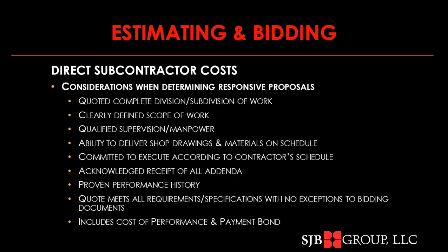Does the subcontractor have a proven performance history? Does the quote he's providing meet all requirements of the specifications with no exceptions to the bid documents? Does the quotation include any performance and payment bonds? One note, since a lot of us are subcontractors, this might be a good list for us to review to improve on how we as subcontractors present to the various general contractors we encounter, to improve our business.